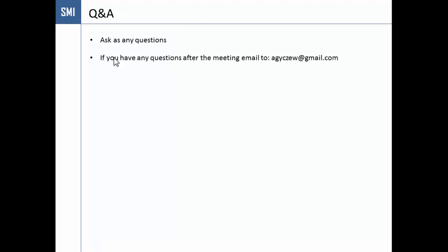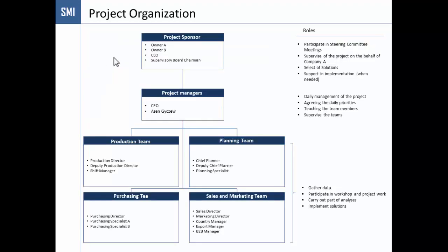And last but not least, you should have a Q&A session where they ask you questions that they have regarding the way you're going to work, or the scope of the project, or the aim of the project. In this case, actually, after a very short kickoff meeting, we had separate kickoff meetings with each and every team. As you remember, we had 4 teams. So we actually had 4 kickoff meetings where we actually started working.